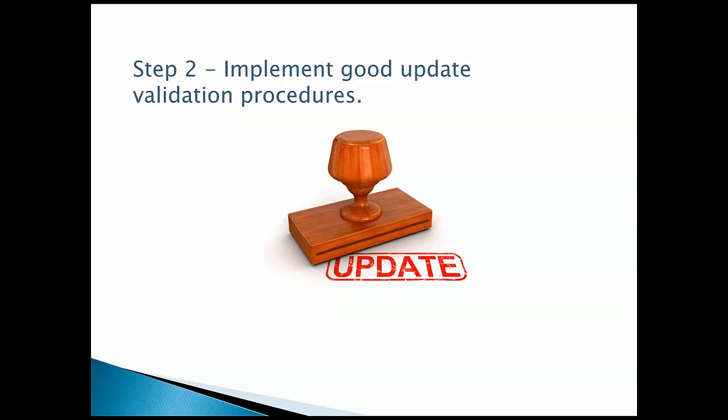So number one, validating it for technical. That's basically the technical review of a schedule, making sure that it meets the CPM, or the critical path method, of scheduling, the techniques with scope, time, and logic. That's the only thing that should be driving dates in theory. Like I said, there are exceptions, but keeping that to a minimum is very important.